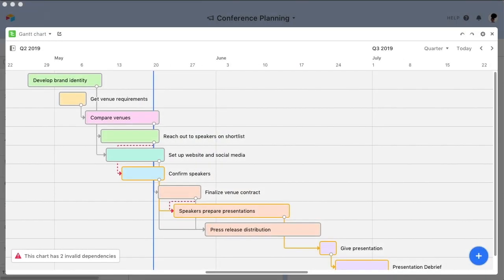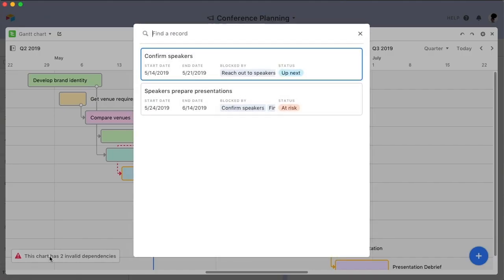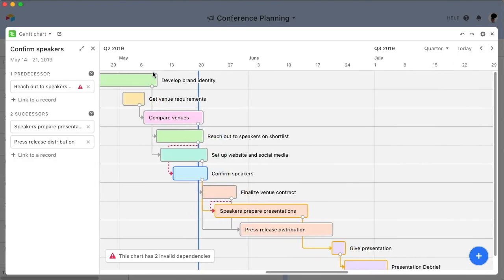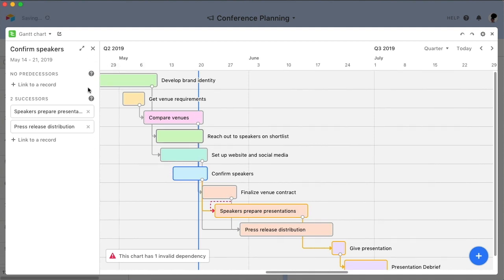If a dependency appears with a red line, it means that the dependency is invalid. It could be that a dependent record is scheduled to start prior to one of its preceding tasks, or that the records are in a dependency loop. In these cases, simply click on the warning icon to address the inconsistencies. If you'd like to remove a dependency, you can click on a record in the sidebar to view any predecessors or successors. Simply click on the X icon to remove either one.